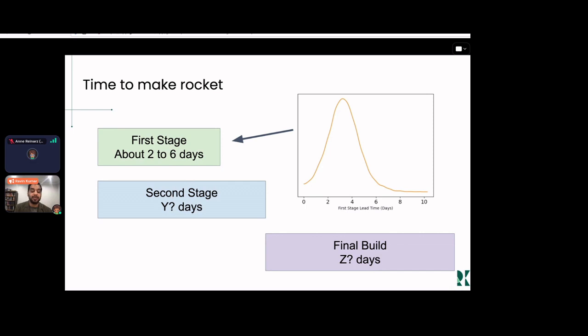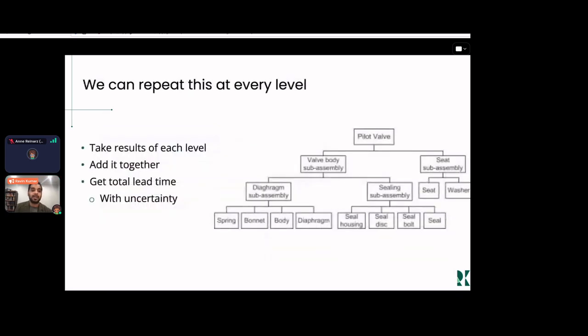So if we want a rocket to speed up and be faster, we want to bring down the samples that are above 20 days. This is how likely that outcome is, and do we need to intervene, like accelerate the process somehow by rearranging some work, paying folks extra for overtime, and really enable some business decisions that stemmed from end-to-end uncertainty quantification.